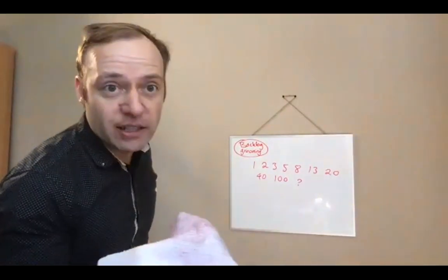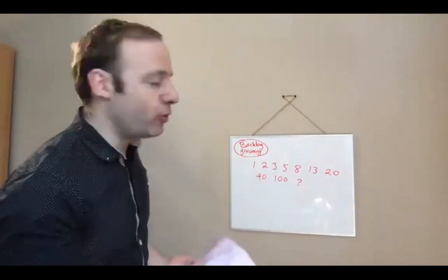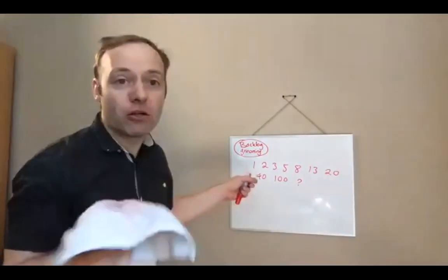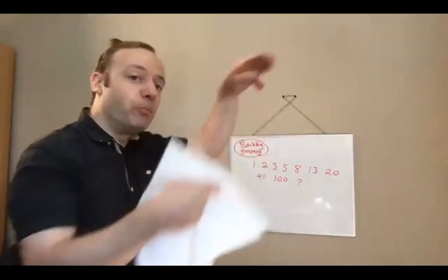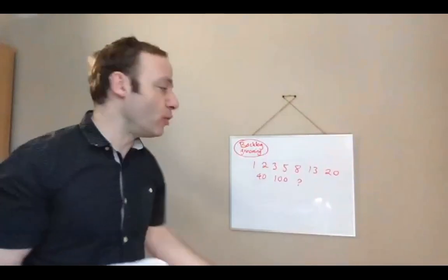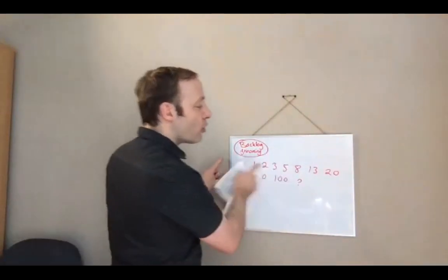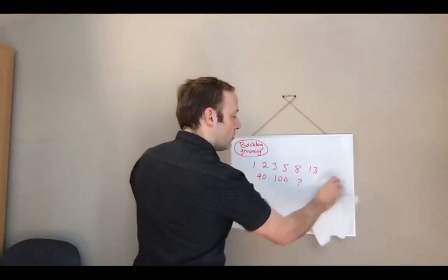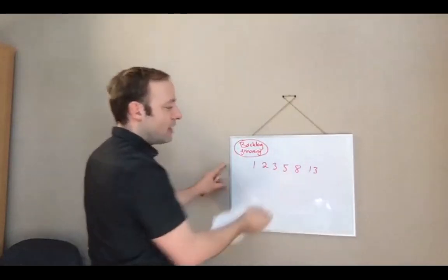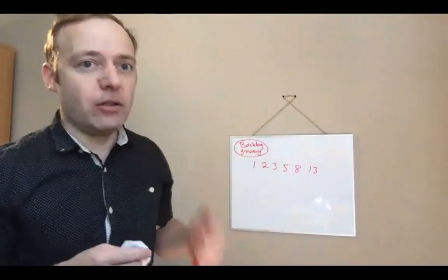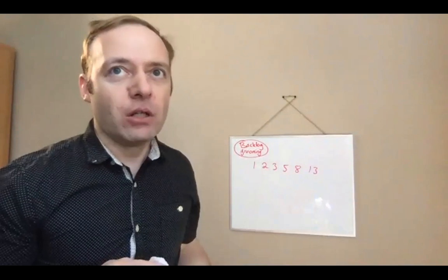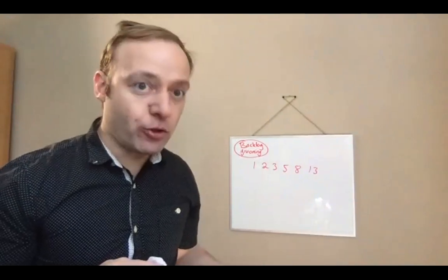Of course, you create tickets in GitHub or GitLab or Bitbucket for all of these user stories, and you prioritize them in the task board, and then you story point them. So 13 or less. 1 point represents either the complexity or the duration.